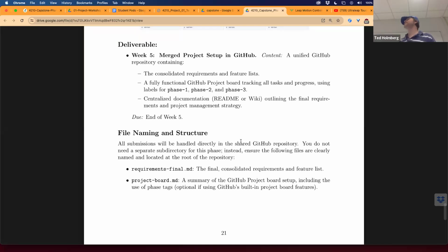Most people are familiar with a stick transmission. So these are the things that allow you to map the user stories to your feature space. And once we get to our feature space, then we can start developing that into our roadmap. And that roadmap will then be published into our GitHub board as a set of task items that have to be built piece by piece.